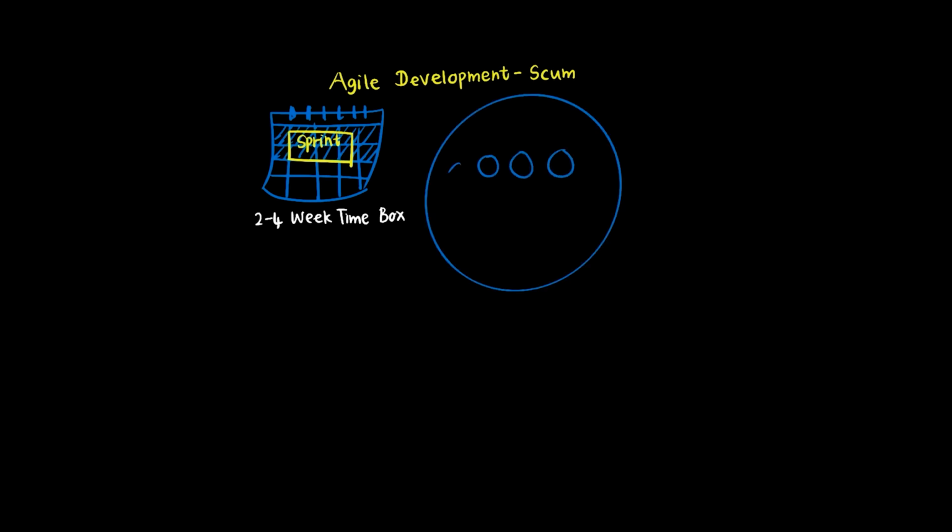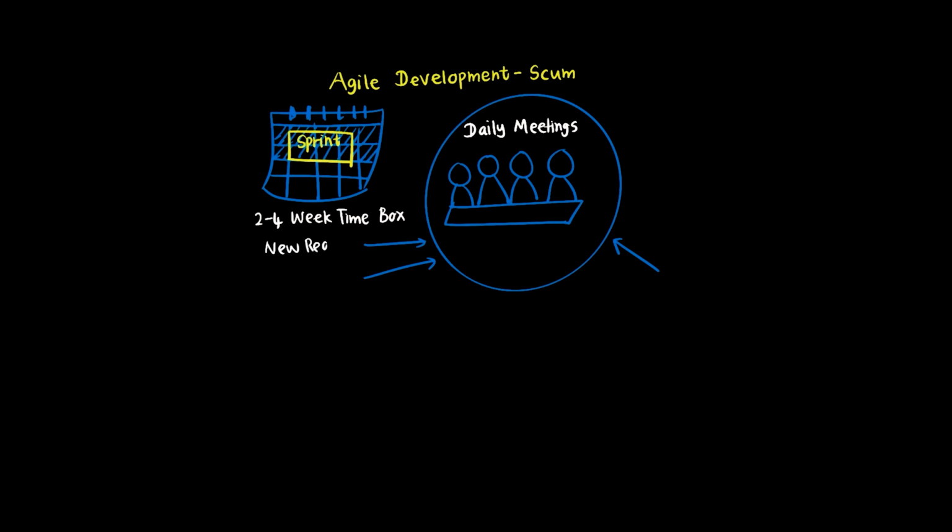To really understand Agile methodology, let's break down how Scrum organizes work. In traditional project management, you might plan for months before seeing results. Scrum flips that by using sprints. These are time-boxed work periods, usually 2 to 4 weeks long, where the team commits to completing specific goals. During a sprint, the team is essentially in a protected bubble. No new requirements or distractions from outside. They focus intensely on their committed work, meet daily to coordinate, and at the end they deliver working software that can actually be used or demonstrated.